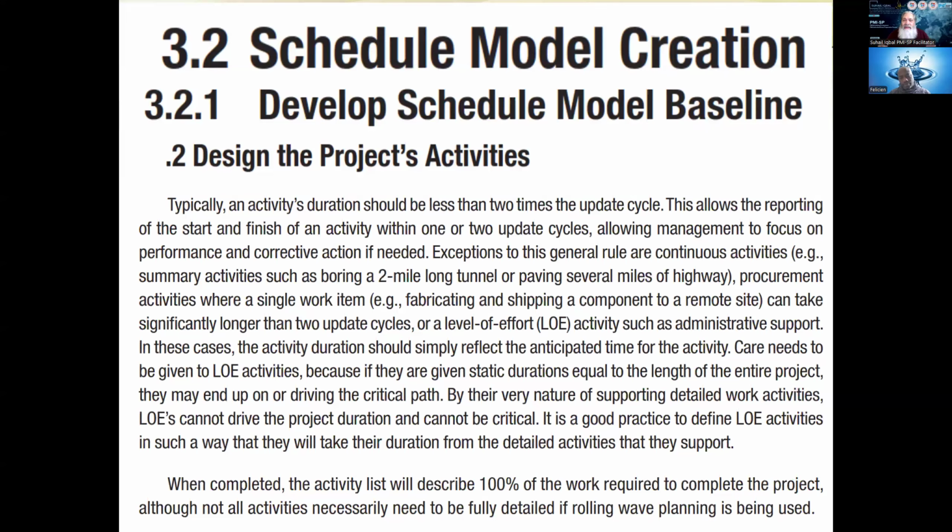Now, this rule can be amended for maybe 3 reporting cycles. You could say 33% per month, per week or something. Or if it is 4 weeks, you could say 25%. So that rule will become 25, 25, 25, 25. In the case of 3 weeks, but these are exceptions. This is not usually happening. My first priority would be 0-100%. That is the safest.